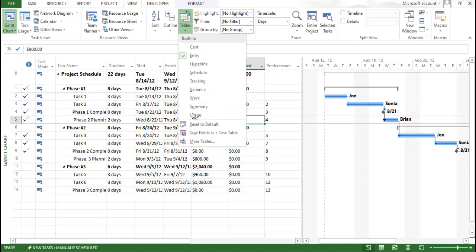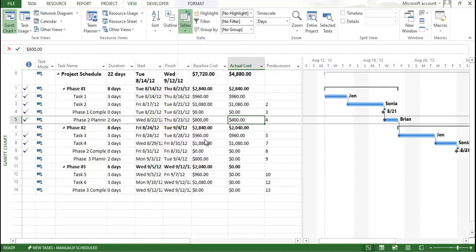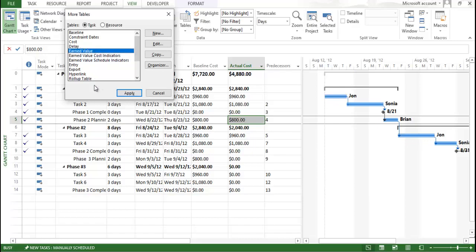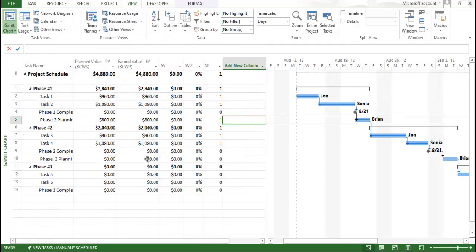Go to Table, click on More Tables, and click on Earned Value Schedule Indicator. In the Schedule Indicator, you get to know the lag and schedule variances. In the Cost Indicator, you will get to know the cost variances. Earned value helps you identify the overall performance. Go to Schedule Variance and click OK.